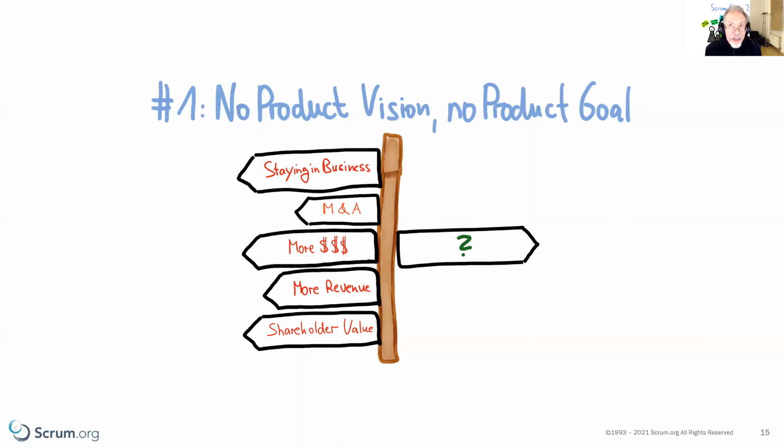My suggestion number one would be that refinement doesn't mean everyone has to be in the same place at the same time, or some virtual place. I like to have an alignment refinement session, let me put it this way, maybe once a week or once every two weeks, where everyone from the team gets together so that we have a joint collaborative approach to the backlog. But otherwise, just the folks that need to refine an item should get together and do it whenever it's feasible.